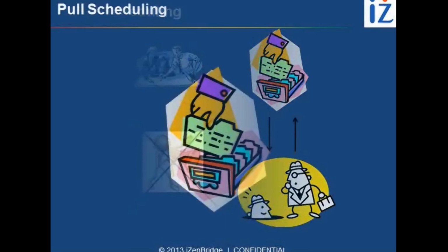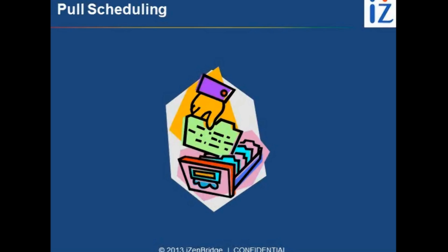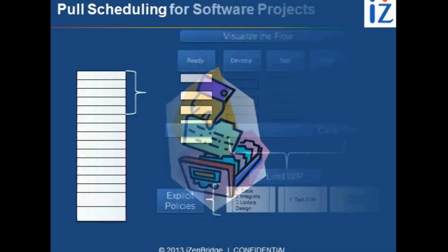So what we do, we create the amount of work which we want to do in the upcoming 2 or 3 weeks, and on the basis of that amount of work, we make a list of it, or we make it visible by way of a sticky note. Now, whenever somebody has resource or capacity available, they will pick it and assign themselves. That kind of work system is called pull-based scheduling, and that is how agile works.